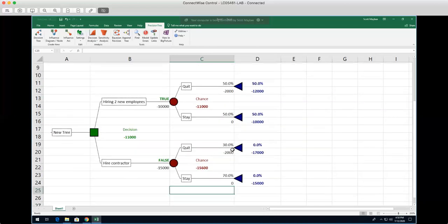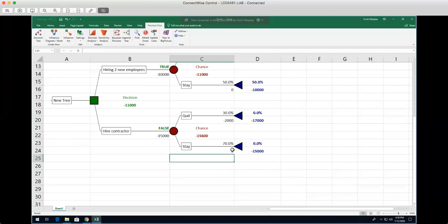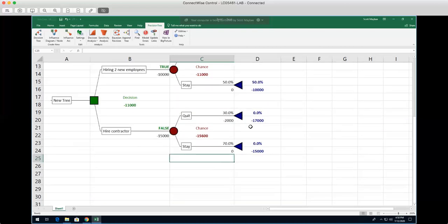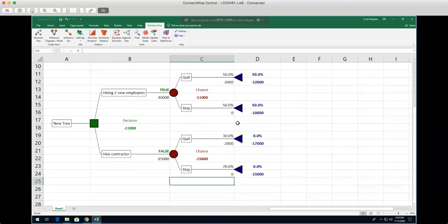I'll either have to hire new employees, or hire a contractor, or pay some employees to work overtime. Either way, I'm looking at the process of looking for a new contractor and the cost of that. I'm not looking for the cost of the contractor itself. It's just the process of looking to hire a new contractor to replace this one. So I'll say that that's a reasonable argument that it would be a cost of -2,000 for both. So I'll leave that the same.